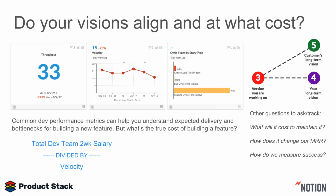Or whatever the scope of it is. And then you can point to these metrics and say, this is how fast our dev team is currently moving. Here's the things we already have in the pipeline. To build this feature out, it's going to take X amount of time, or we're not going to be able to start this for X amount of time. And so that helps start that communication of aligning vision internally, right? But then also being able to communicate it externally to your customers around delivery or any type of expectation of whether or not that feature is going to be built.